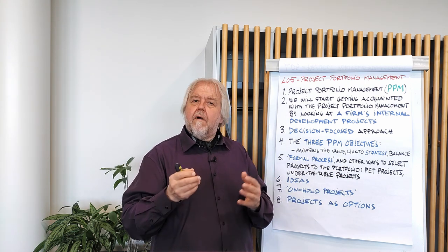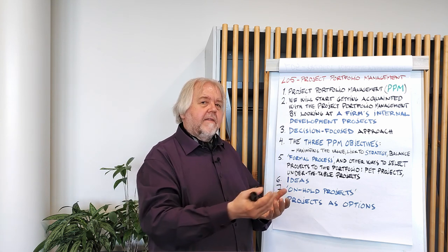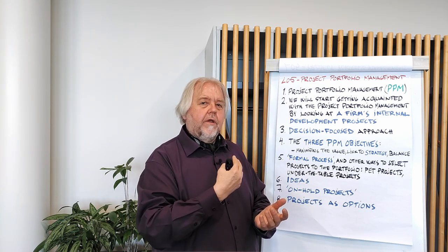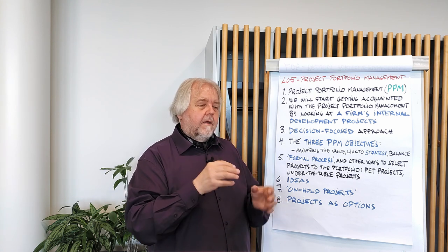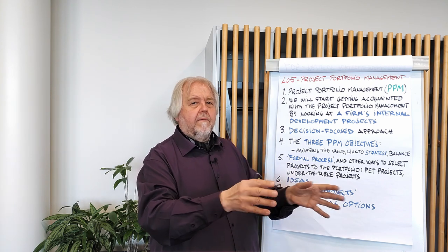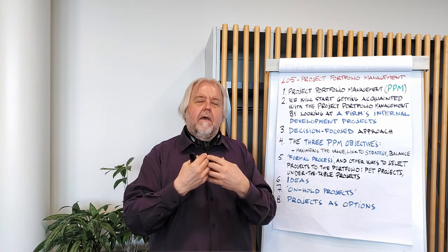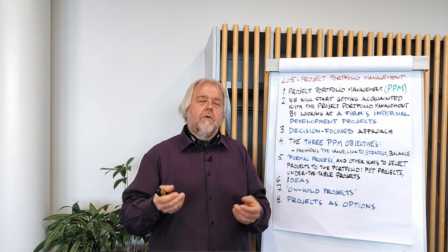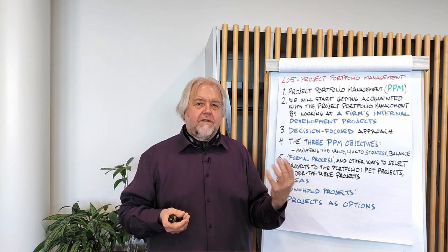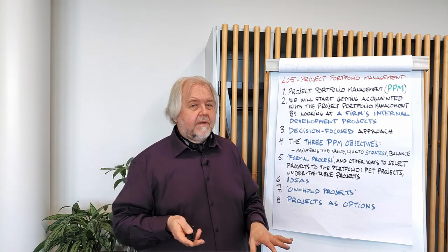Or if we have a big market uncertainty, we could initiate different products to different market segments to scout the markets, and in this way learn, to have projects as options that scout markets. Then we would select one when we know, and that was a worthwhile option that finally realized in good profit or value, and the other ones were options that didn't realize the actual value. They were maybe abandoned or killed or something.